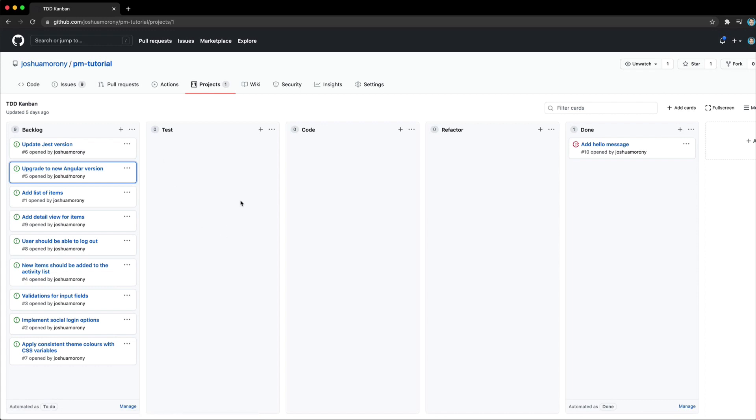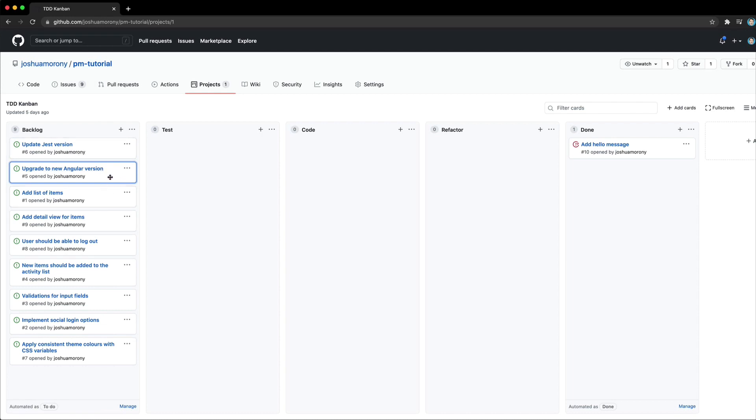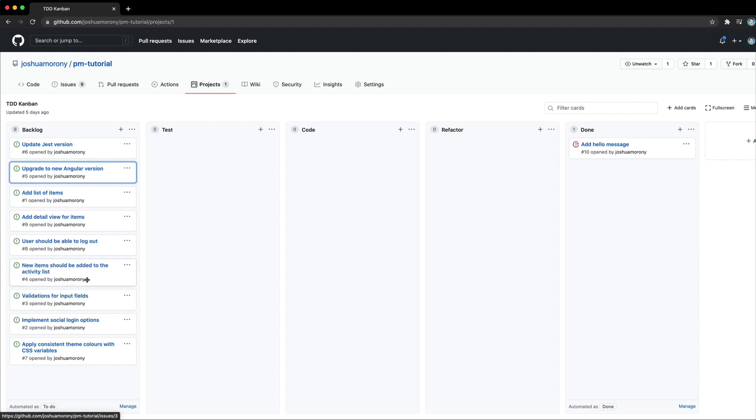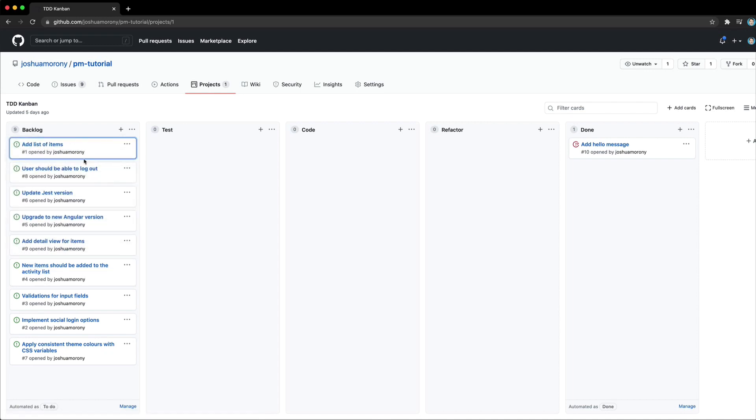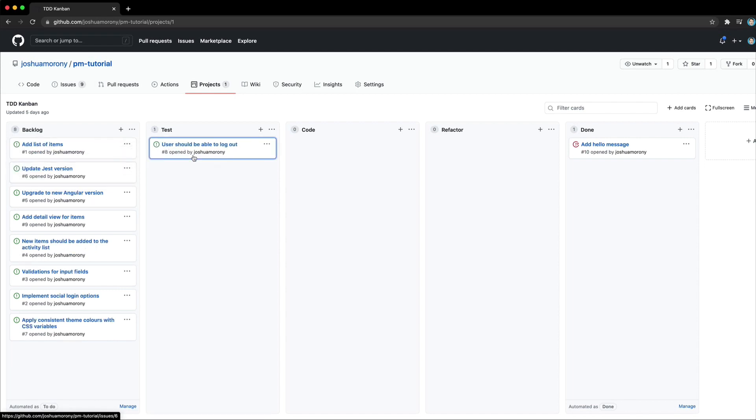So what we have set up here is that any issue we add to this project is going to be automatically pulled into this project here. And it's going to be added to the backlog column. We will then sort this backlog by the priority of the items. So the more important items or the items we want to work on sooner are going to be pushed towards the top of this backlog. And then we are going to pull in items that we are working on from the backlog into the other columns.